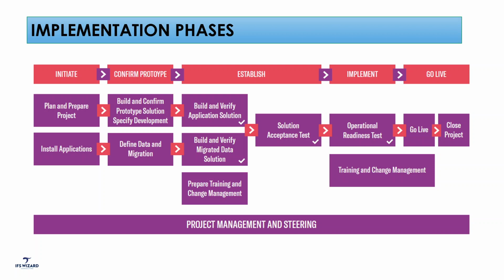After the book of rules, we specify the prototype. In the confirm prototype session, we are going to do a demo. This is going to be your prototype, and once the client approves that prototype, we move to establish. So in this phase, we specify the prototype, build the prototype, and then confirm the scope and the prototype. In my experience, we don't move to the establish solution phase unless the client confirms the prototype. That's a key thing as a consultant and as a client.